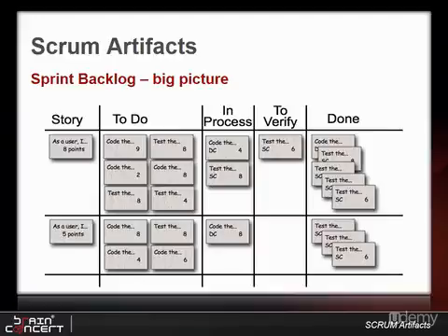The second reason is that one-day tasks provide good red flags that the project might be veering off course. It's a good practice that the Scrum Master should take the opportunity to investigate what might be keeping the team member from finishing work. If a development team member reports that he or she is working on the same task for more than 1 or 2 days, that team member probably has a roadblock.